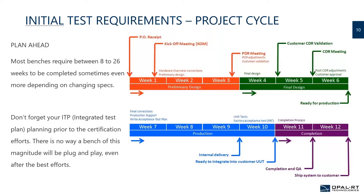Regarding the project cycle, in aerospace we are all acquainted with project management — it's part of daily life. For test benches, we don't do anything different: the key word is plan ahead. A lot of equipment requires long lead times, so you need to account for that in your timeline to avoid delays. Some equipment, like GNSS for GPS control and star-map simulation, requires government approvals, which can take longer than expected.